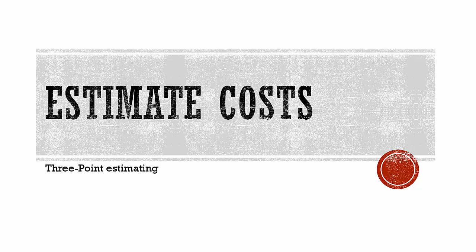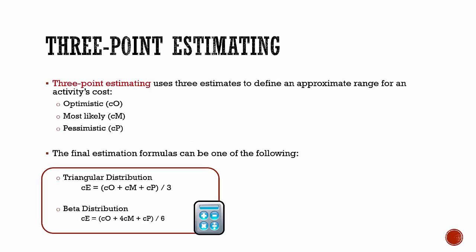Three-point estimating improves the accuracy of cost estimates by using three estimates to define an approximate range for an activity's costs. The three estimates are: most likely, which is the most realistic assessment; optimistic, which is the best case scenario; and pessimistic, which is the worst case scenario.